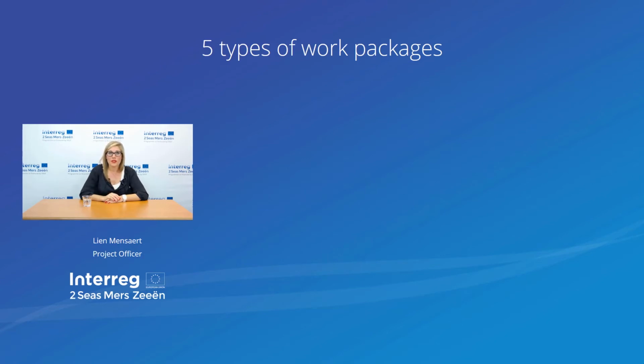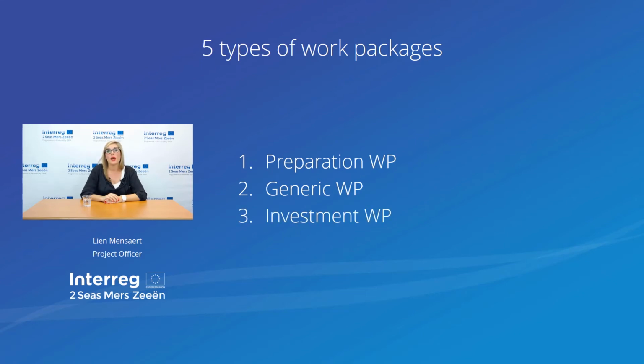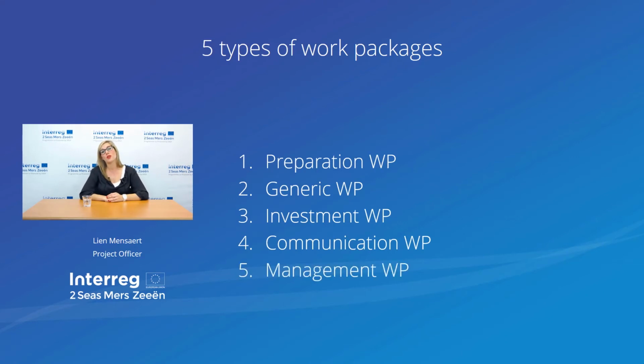Now we go to the types of work packages. We have 5 types of work packages in total. The first one is the preparation work package. Then we will have multiple generic work packages, potentially also investment work packages, and then to finish off there are 2 mandatory work packages, which are communication and management.